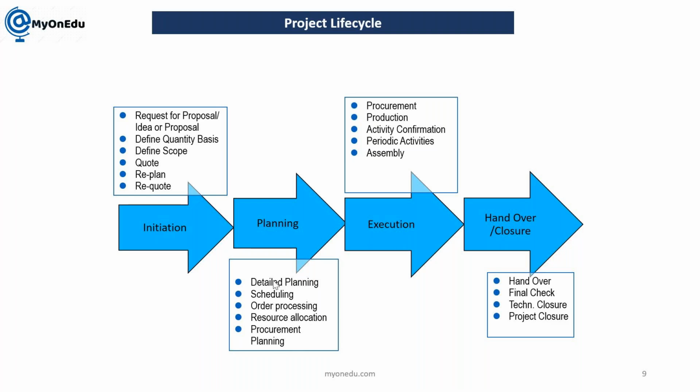If it is ASAP methodology or the waterfall model, the first phase is requirement gathering. The next is BBP, business blueprint preparation, then realization, then final preparation, and then go live. So these are the five phases we follow to implement SAP.